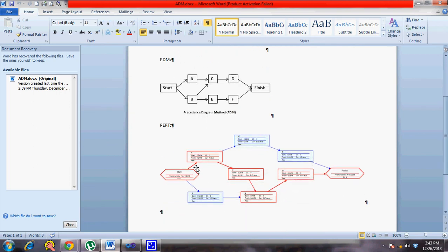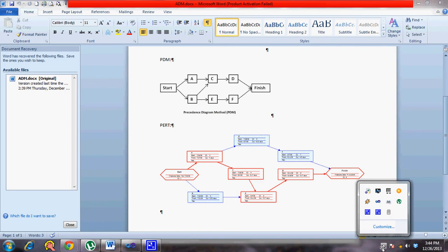There is this PERT technique. I have this here mainly to show there are milestones here. If you can see them, the milestones will not have any duration related to them. The start and finish have milestones, but they have a date, they don't have a duration. But for the other activities there will be duration. So that's where milestones are also part of your diagrams. So this is about the schedule network diagram, which is part of the sequence activities process.